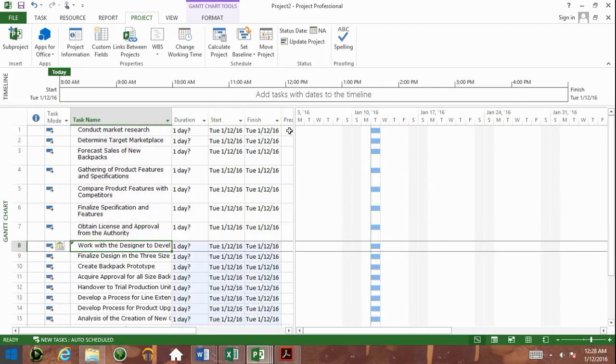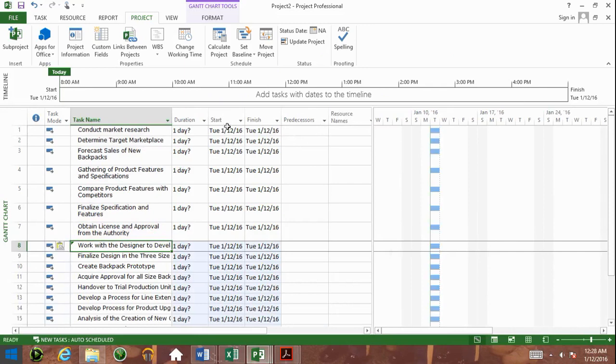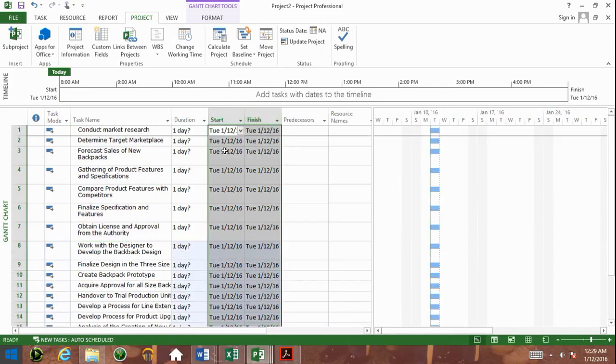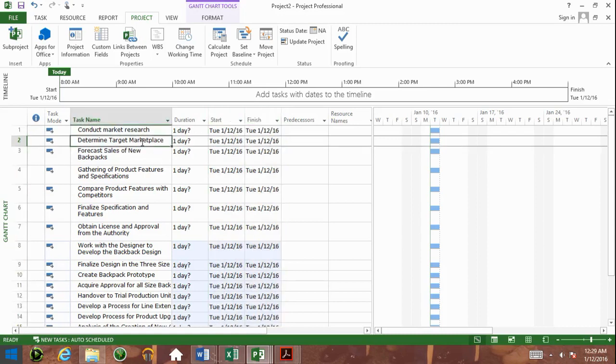Now, this is all well and good. You can see that Microsoft Project has automatically put in start and finish dates. That means when you get into this tool, do not put in a start and a finish date for these activities, except it is a hard stop. In fact, you might want to be careful about fiddling with start and finish dates at all, because they will impose constraints on your schedule. So for now, think about it like this. Anything you do in this tool needs to be done outside your start and finish dates until you have a better understanding of what it is.